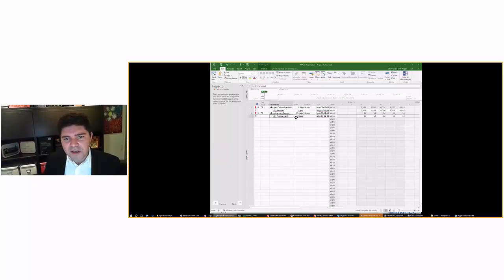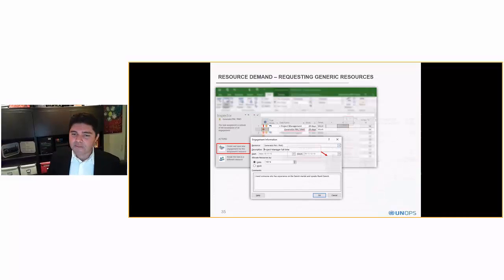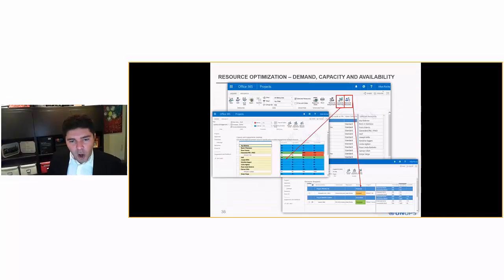One of the things I can see here, if I go to my resource engagements page, is that I'm actually requesting the retainer, but not in the amount of work that I need. I can see that it is proposed work. All the proposed work is actually here. If you want to change something, you can just come and change the proposed work, which is perfect. I will keep this open because it's still proposed, so I cannot use my resources. Going back to the slides, I have requested, and the tool is providing me all the steps.